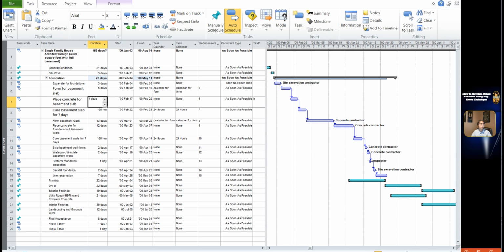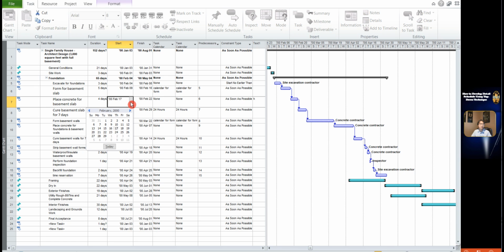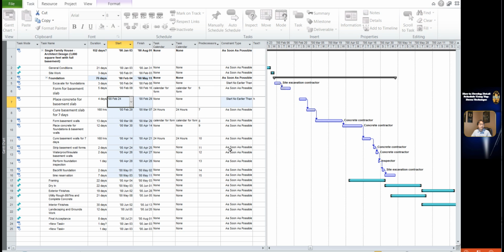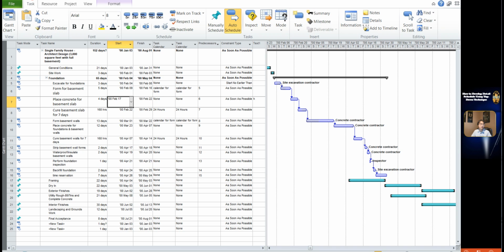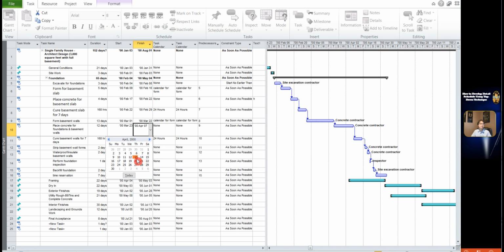Both of them should be calculated dates. If you change the start date and the finish date, it means you impose the date in the field. It will cause a constraint setting on the date. It will distort the schedule calculation result.